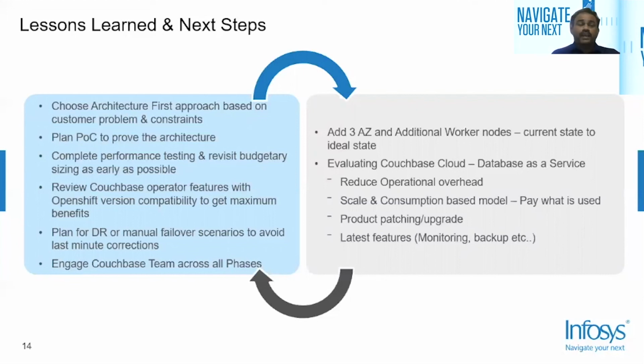And we really recommend doing performance testing as early as possible, whenever your production-like environment is ready. The primary reason is that when you start doing initial budgetary estimates, you go ahead with some ballpark estimates, you come up with a capacity planning and you start building something. But if you want to ensure that what you build, what you pay for, is sufficient to handle your workloads, do the performance testing as early as possible.